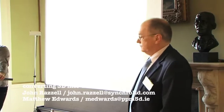With Synchro, you can make that change, then run the scenario and think, no, can't do that because it's going to cut something up here. So you can go back and move it around until you get the scenario right. So you know that 6 months and 10 months from now, what you decide today isn't going to have an impact, because you can see visually that there's an issue and start working around it. What I want to do here is show you a baseline comparison on the video as well.